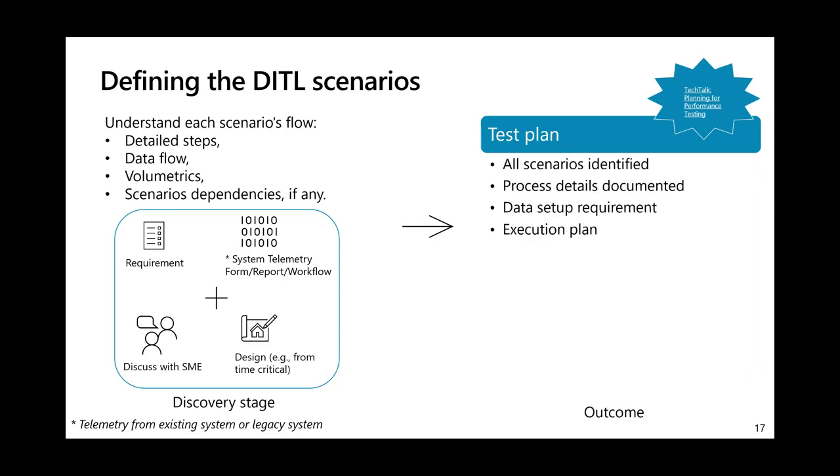In the test plan, I have written down all defined, agreed scenarios. I have gone through all the defined scenarios in the UAT environment to capture the required details step by step. It's something like a test script, but you need to identify which test script you refer to. Through the detailed step capturing, I have captured the data required for that particular form.